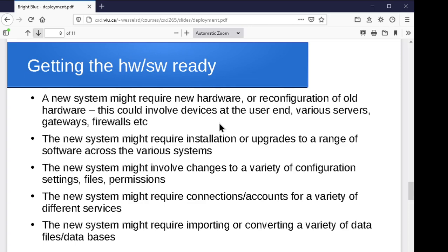Suppose you decide that we're going to shut everything down Friday night, and we're going to spend Saturday and Sunday going through and getting everything installed and configured and ready to go for Monday morning. That sort of Friday night, Saturday, Sunday night can be pretty chaotic. There can be a lot of different things going on. It can be really easy to miss a step if you're doing things manually, to forget a setting or to type something in wrong, or just to mess up one little thing that has all sorts of repercussions later in the install. So as much as possible, you want to try and automate that process, right?